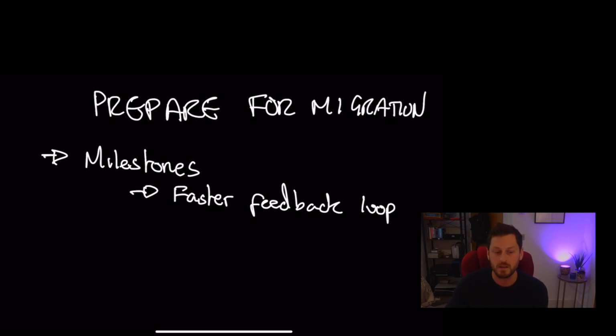Whether you're migrating like for like, or if you're migrating with enhancements, you need constant feedback and you need to get it to production as soon as possible. So make sure that you've broken your project down into milestones. Don't have this megalithic, monolithic legacy service and say, we're going to sit in a box for a year and then at the end of that year, we'll deploy everything. Don't do that. Break it down into milestones. Next thing to make sure is you have product experts.